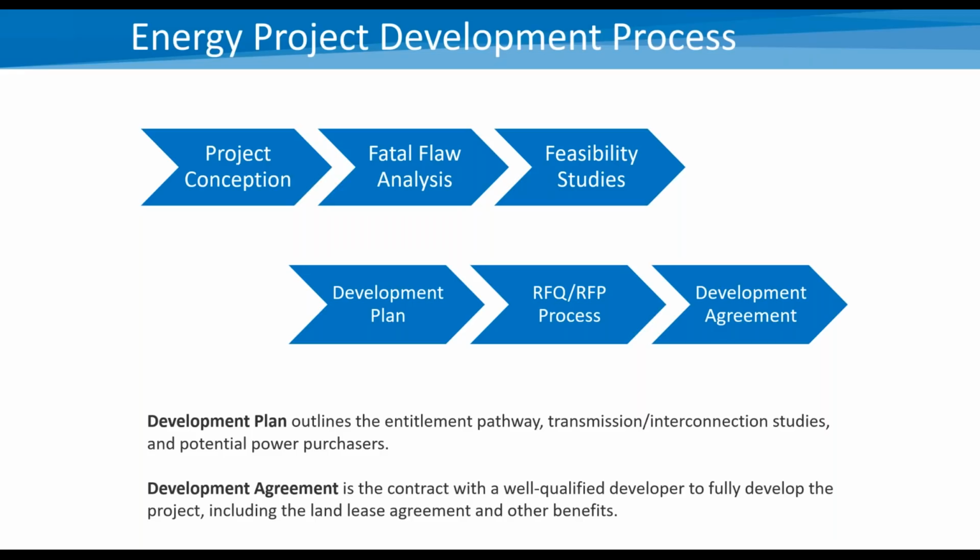From there, as you continue to, say, de-risk the project, it would be time to go through the RFQ, RFP process, and then select a good development partner who's well qualified and experienced to fully develop the project. They can execute a land lease agreement, and they can also provide the commitments to community benefits. And that leads to ultimately the development agreement. Next slide.